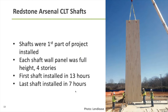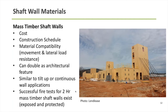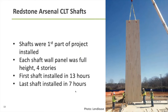That project you just saw is a four-story hotel in Alabama, all framed with cross-laminated timber. They installed three shafts, and the first one they erected — all four sides, all four stories tall — took about 13 hours. As they got going and picked up efficiencies, by the time they got to the third shaft, they installed all four sides, all four stories tall in about seven hours. You can really start to see some potential benefits in speed of construction.